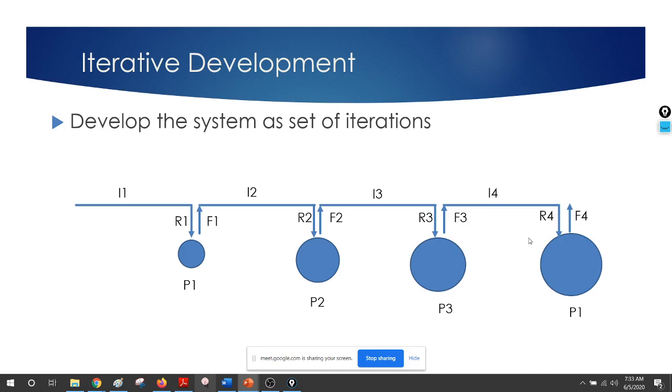So what are the big advantages? You can see all of a sudden a lot of advantages are there. The customer can now see what the product is going to be. Now there is no uncertainty for the customer, because the customer can get a feeling of what kind of product I am getting, right? Then it reduces the risk. And also when we get the feedback, we know whether the customer is happy with the way things are going or not happy, right? Otherwise in waterfall, only at the end do we know that the customer is really upset about our product. But now if the customer is upset, we still get the feedback, and we have enough time to rectify, right? So you can see it's a lot of advantage.